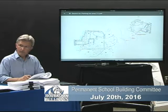And maybe to clarify, the contingency transfers are related to how we bought the work. Not that it wasn't shown on the drawings, but we only bought a certain part of it within the GMP. That's why it's not out of your contingency, the owner's construction contingency. It's out of the GMP contingency. It's to finish buying out the job. Right. Okay. The installation wasn't covered. Yeah.